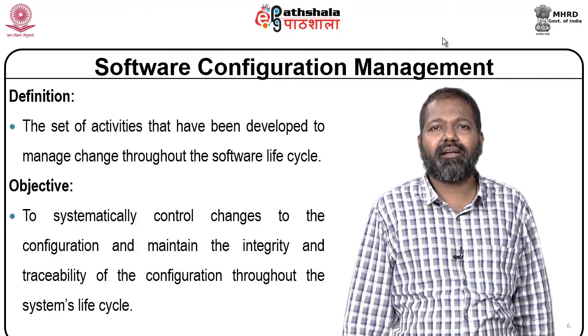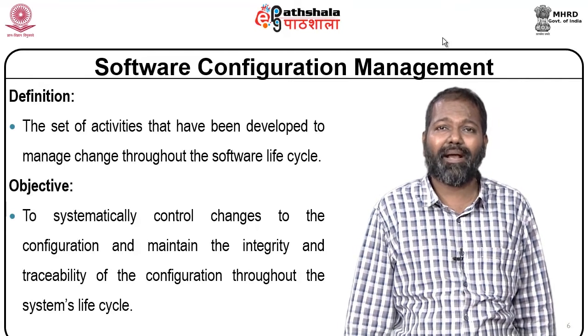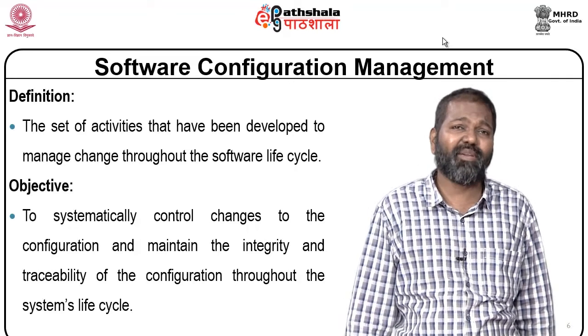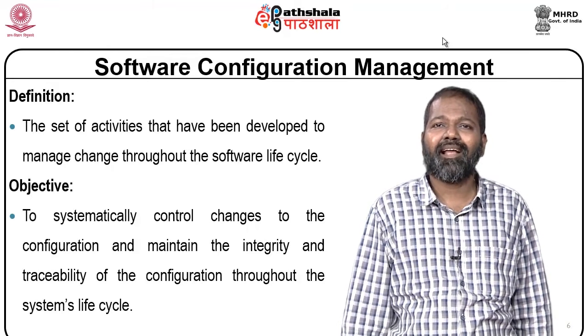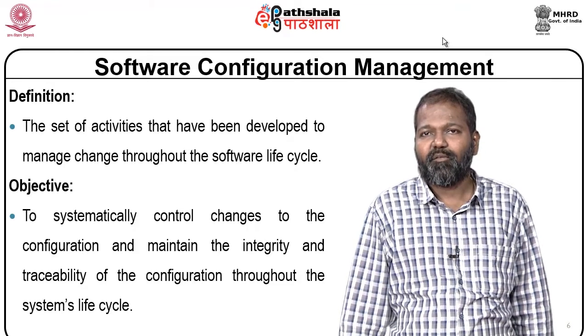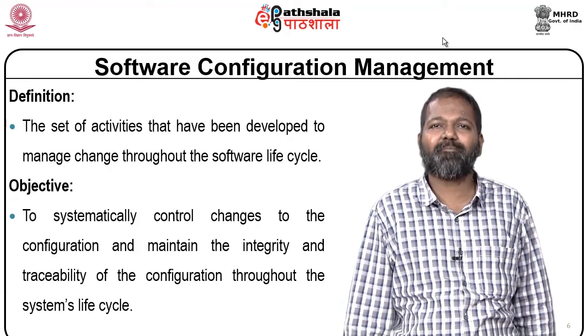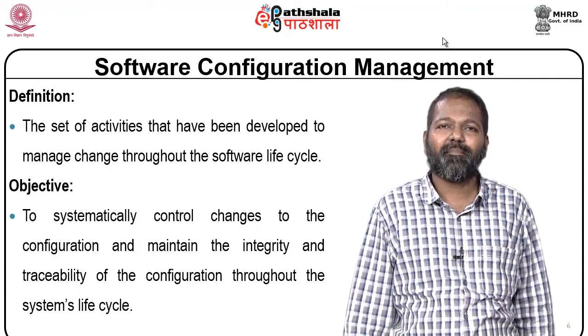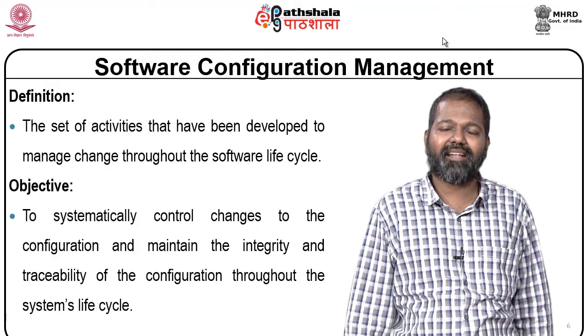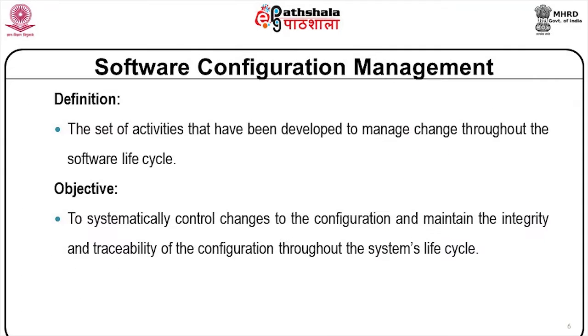the deliverable SRS is also signed by the client and the developer, and we have entered into the design phase. When there is a change, we have to go back to our requirements analysis phase, make the changes and then re-enter into the design phase. The degree to which the changes will affect the artifacts that are developed has to be carefully addressed.